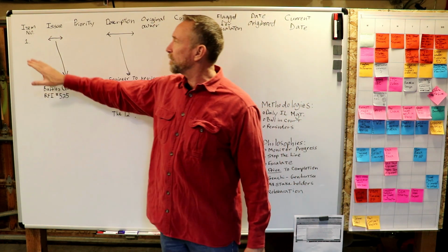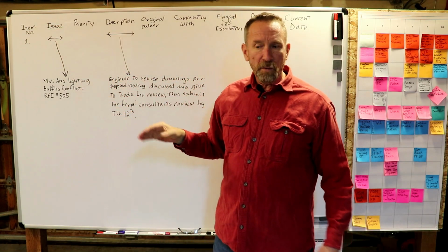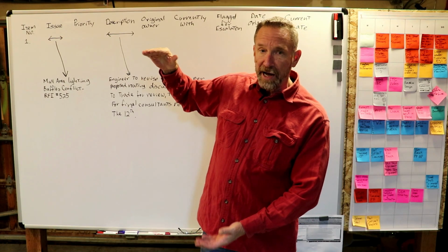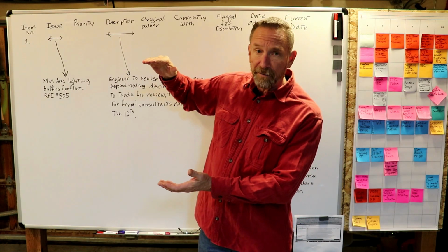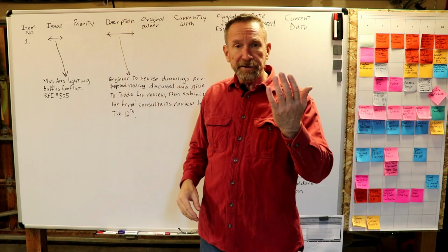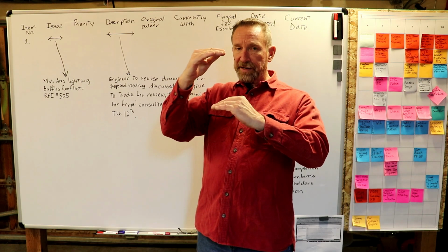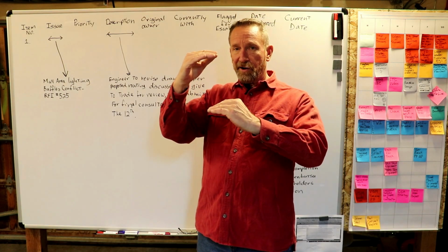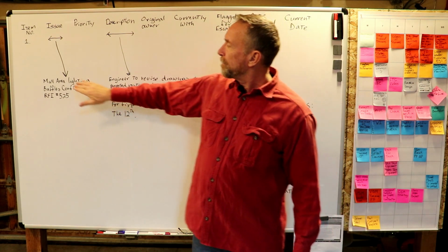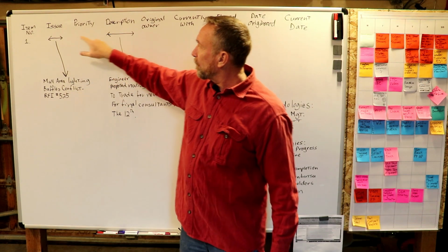And it's just a spreadsheet. We capture the item number so that we can keep track of where we are in the long list of issues that we're going to have over the duration of a job. So we might want to know that 200 of them are already complete. And of course, those will all be hidden when we open up our sheet. We can open it up and go back and look at them. But the only thing that we see on our current issues log are going to be the things that are actively live right at the moment, work in process. The next item is going to be the issue, and we'll talk about what issues are in a moment.